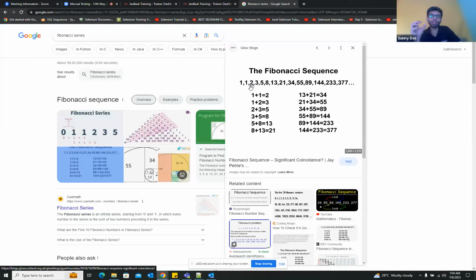If you are giving the story point as 3 and 2 people are working on it, it should be completed within 3 to 4 days. If one person is working on that, it should be completed within 1 week. If 3 or more people are working on that, it should be completed within say 2 days or a maximum of 3 days.